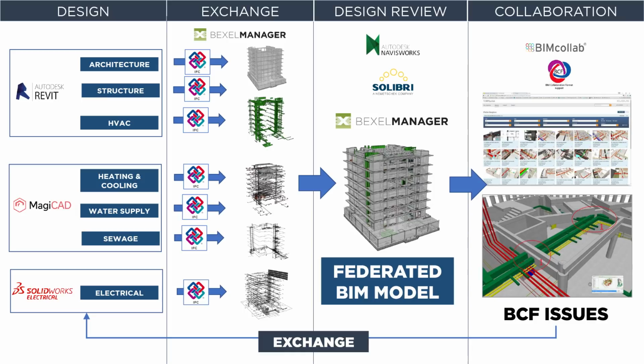In practice, it's very likely, for example, for the structural model to be developed in Revit and the MEP model to be developed in MagiCAD, and then the structural engineer will export his model into IFC and send it to the MEP engineer, who can now import that model into MagiCAD and use it as a layout for sewage and installations, for example. In the end, engineers of different disciplines will each create their own IFC files, and we can end up with hundreds of different IFC files for more complex projects.